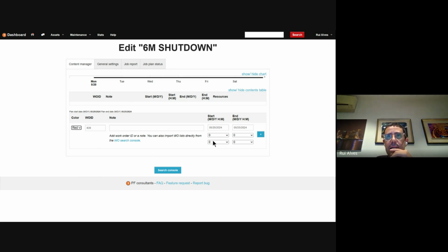For 839, because it's the first thing we're going to do, we're going to leave it on the start day of the project, which is the 20th of May, starting at 8 o'clock when the first shift comes in to start working. This is one of the things I mentioned about the report at the end, the knowledge base. I'm assuming it will take 2 hours, from 8 to 10 o'clock on the same day.